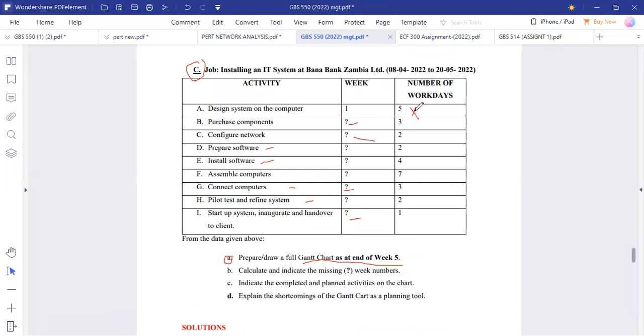That 5 days is our guiding factor that they're not working the other days, unless they had put the 7 here. We haven't seen any day here beyond 5. So that's why we have an assumption that they're only working from Monday to Friday. I think the lecture even clarified that we should just consider 5 days. Okay, all right, then that's okay. So that's the maximum 5 days there.